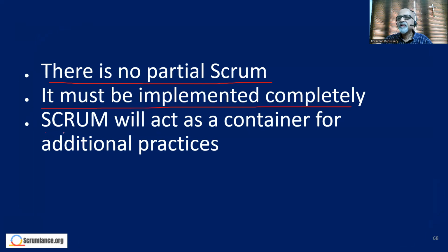Scrum will act as a container for additional practices. The Scrum guide just defines the Scrum framework. As and when, or if the team feels that some additional practices must be included for delivering better value, you are free to do so. But the Scrum framework cannot be altered. That remains